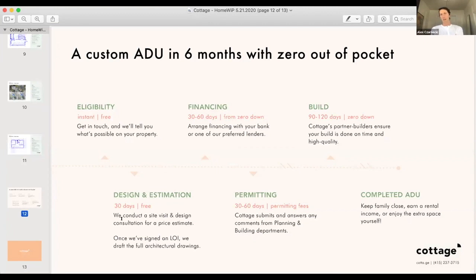And that comes to you in your estimate. So ultimately we do this on a case-by-case basis, because it's a really big difference if you're drawing the sewer line 100 feet into a backyard, down a 20% grade slope, through a redwood grove, versus just tying up to the existing home on something that's closer to the street.